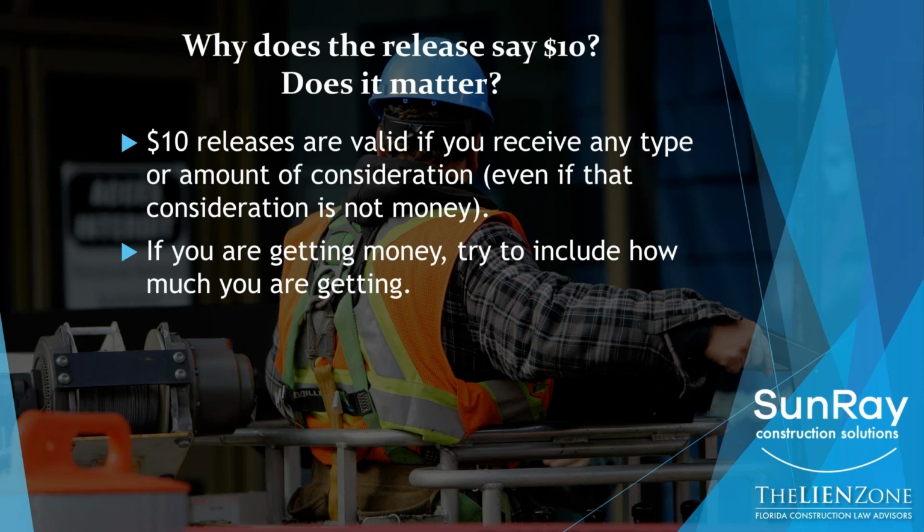$10 releases are valid if you receive any type of consideration, and sometimes even if you receive no money. So let's talk about when a $10 release is no problem. You shouldn't think about it twice. You're a subcontractor on the job. You've sent your notice to owner early because you've signed the contract, but you're still waiting to show up on the job. You really haven't done any work. Now that the owner and the contractor have your notice to owner, they need a release from you, but you don't have any work. You haven't done anything. You haven't submitted any bills.